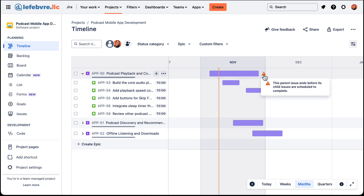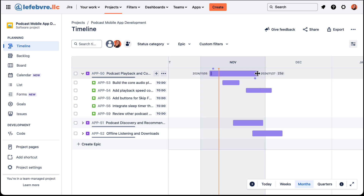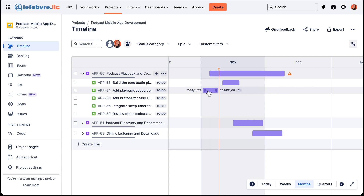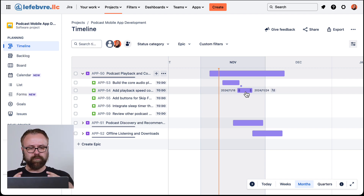You'll notice this is saying the parent needs to be longer, because the epic is supposed to be inclusive of all of the children. So we would want to extend that if we think the child issues are going to run past either the end or the start — you'll see that as well.